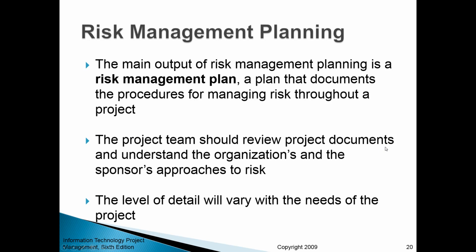Now, before and during the process of creating a risk management plan, the project team should review project documents and understand the organization's and the project sponsors' approaches to risk. Some projects are risky by nature. They are initiated by companies to pursue risky opportunities that can potentially result in high reward for the organization, while other projects are more mundane. They don't involve any risky endeavors. They're rather initiated to incrementally improve organizational performance. So depending on the nature of the project, you may have a different plan for dealing with risk.